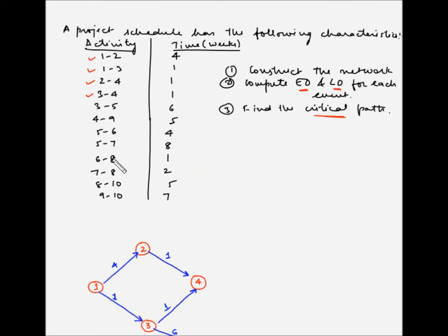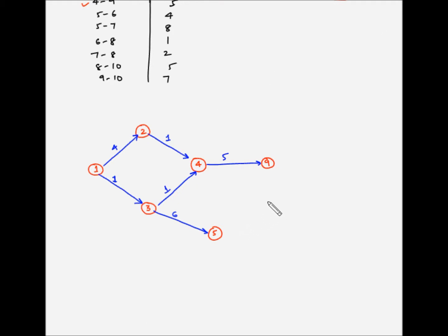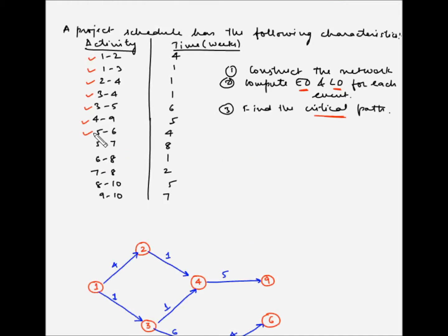Now activity 4-9. So 4 is here, let us draw 9 and the activity 4-9, which takes 5 weeks to complete. So we have done 4-9. Next is 5-6 and 5-7. So 5 is preceding both 6 and 7. Let us draw 6 and 7 and the arrows. Activity 5-6 takes 4 weeks and 5-7 takes 8 weeks. So 5-6 and 5-7 are done.